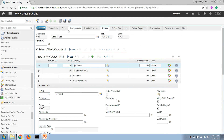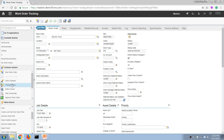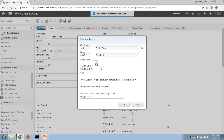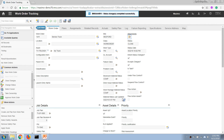In most organizations, we also need to attach all supporting documentation. We can do that by going back to the work order tab and choosing 'Attachments', where we can add invoices, time sheets, and inspection documents. After that, we can change the work order status to 'Close' to close it.